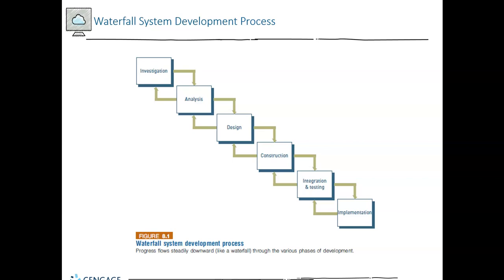And we might refine it as we go through the slides, but maybe they put some things in slightly different stages than I have. But the main thing you want to remember about waterfall is that usually to get to this stage, for example, you have to complete this stage, something called deliverables. So this stage will have deliverables. It will have like proposal documents, whatever, like this is feasibility. That's probably more in this phase actually, but requirements documents would come out. So you'd have these things called deliverables. Think of deliverables as what you need to have complete before you can start the next stage.